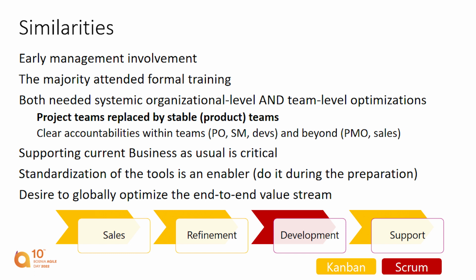One of the changes with the most profound influence on their processes was replacement of project-based teams with product-based teams. They used to have project-based teams. Starts the project, they create a team, and once the project is done, they kill the team and then let people wait until there is a new project. Assign them to another project where they become members of a new team, which is crazy, but many do that.